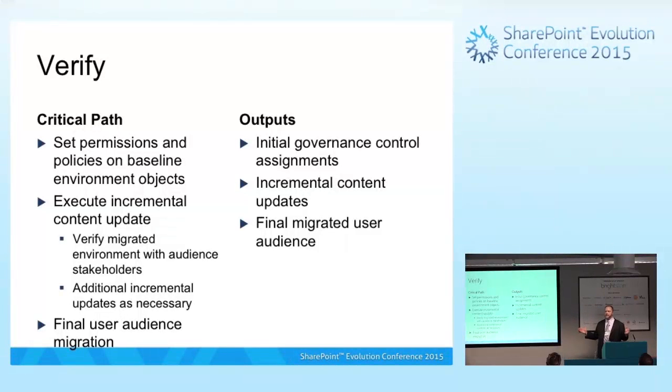If there's a time delay of any significant degree between when the baseline happens and when the cutover to the new system, when everybody's told this is your new intranet and you must update here, not here, then there's going to have to be a content update. But that's good, that's fine, we understand that, and I have good news. You have a map that tells you exactly where everything is.